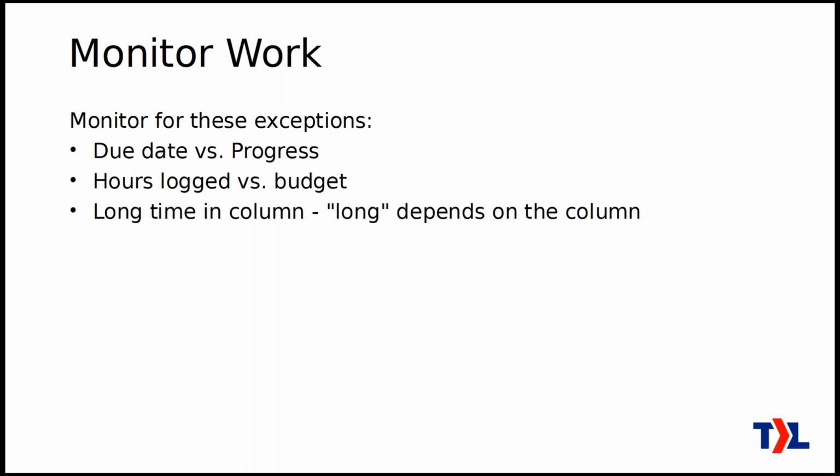You're going to be looking at a long time in any column, where actually long depends on the column, because something that is in, say, an in progress column, which I'll get to in a minute, can maybe be there for a day or two, but then you want to see it move on. You don't want to see it in progress for too long. Compare that to something where maybe you have a column for tickets that are waiting. Maybe you're waiting in the mail for the router to come. And if it's waiting there for 10 days, that's not a problem.